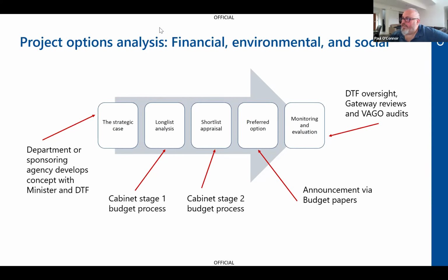And then throughout that, this concept of monitoring and evaluation is probably an area that is a bit weak in Victoria, particularly the evaluation component. There's quite a lot of monitoring, but we find as external auditors, there isn't a lot of final lessons learned or evaluative work done, to actually share lessons for the next project and maybe in a similar domain. So that's actually a live issue for us, and we talk about it quite a bit to departments.